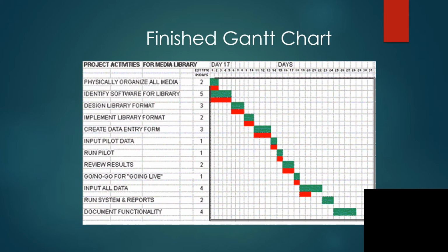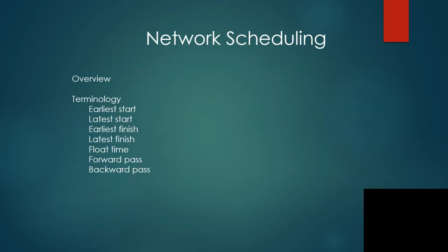In the final analysis, Gantt charts are great for small projects and for making summarized presentations to management and customers. But for larger, more sophisticated projects, use network scheduling. Networks are not unique to project management. Think about computer networks and networks of various things, including people. Since a project is represented by a series of interrelated activities, the network concept is perfect to define a project.